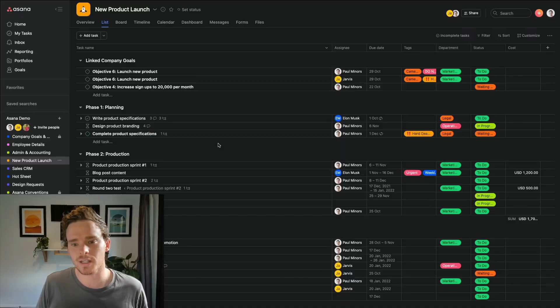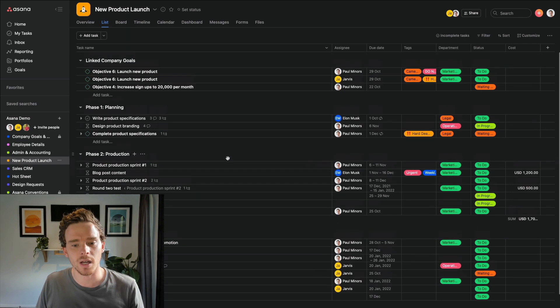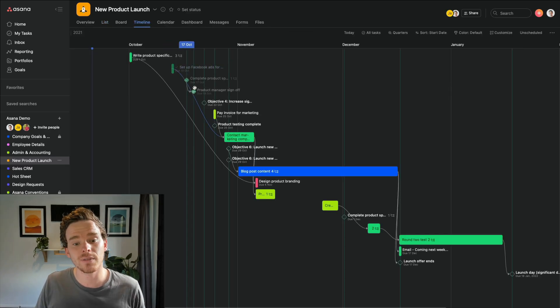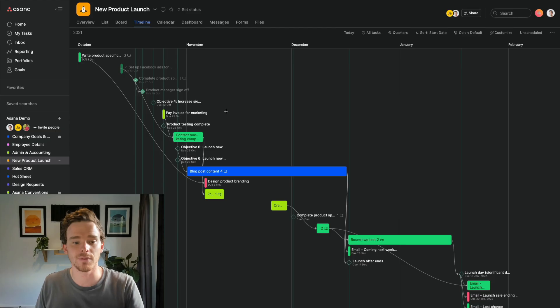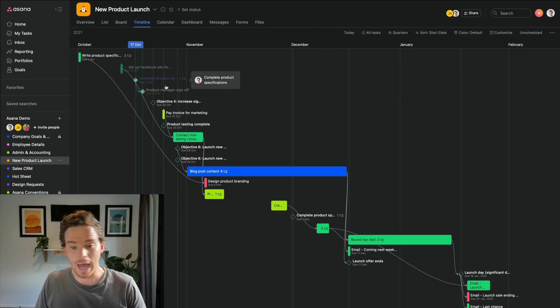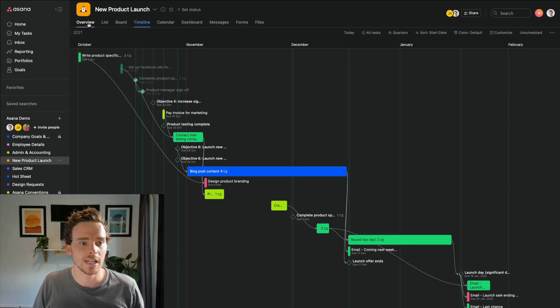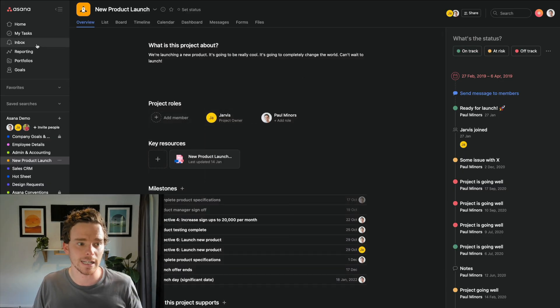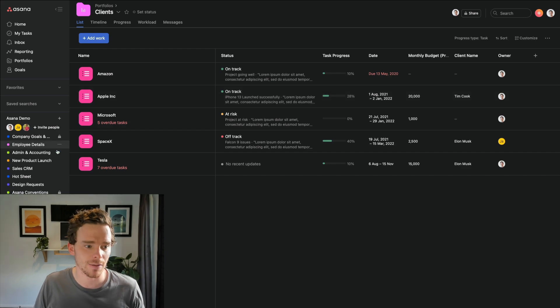Now let's dig into temporary projects in a bit more detail. You should create an actual project in Asana for temporary projects if the project is large in scope — maybe something you're working on for three to six months or more — and if there's a lot of work to complete, as you can see here with quite a lot of tasks going through various stages. Other reasons to use an actual project include taking advantage of key features like the timeline view with milestones and dependencies, using the overview to track milestones and goals, and linking into one of your portfolios.